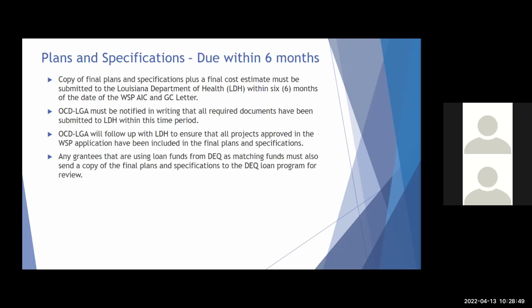Also, any grantees that are using state revolving funds from DEQ as matching funds must also send a copy of their final plans and specifications to the DEQ loan program for their review, and they will follow up with us as to whether or not all items were included.